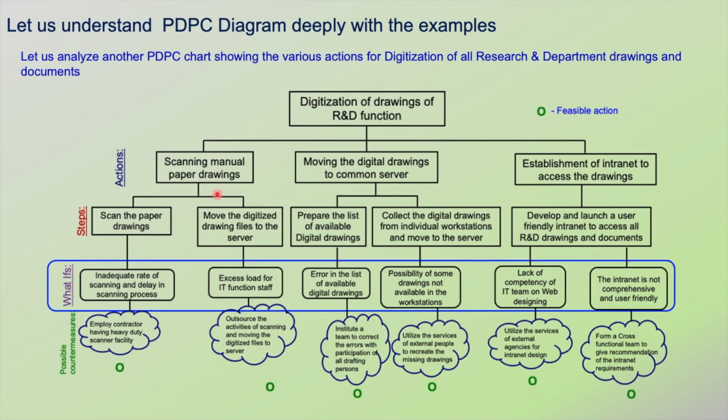Similarly, for this step of moving the digitalized drawing files to the server, what could be the problem? Excess load for IT function staff. So what could be the solution? Outsource the activities of scanning and moving the digitized files to server.